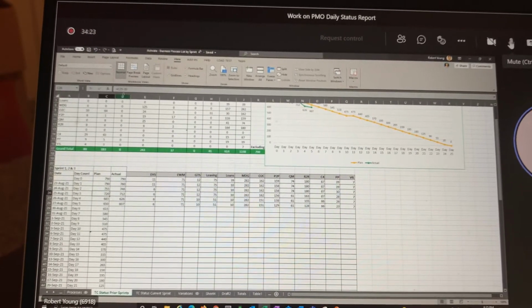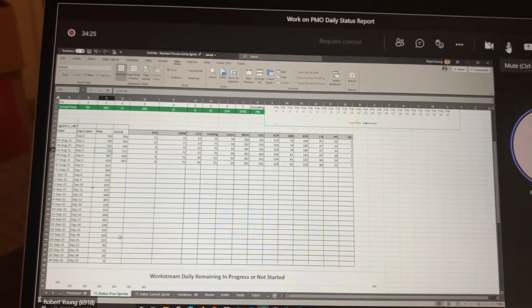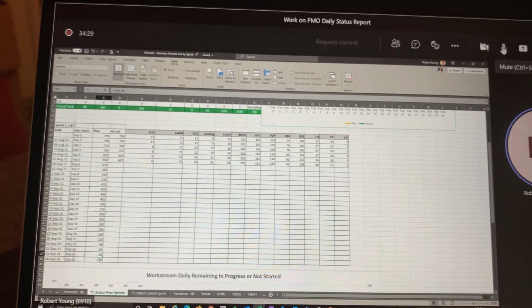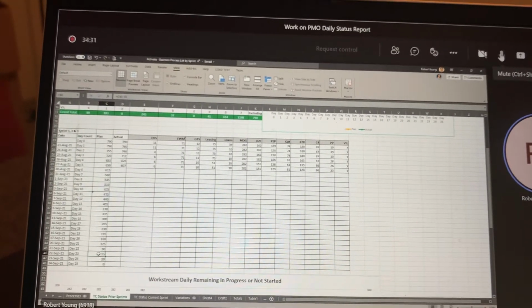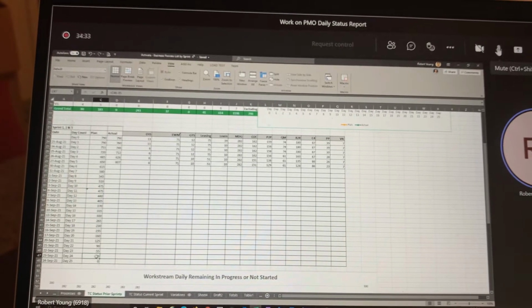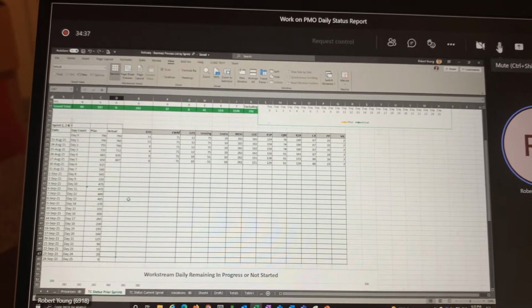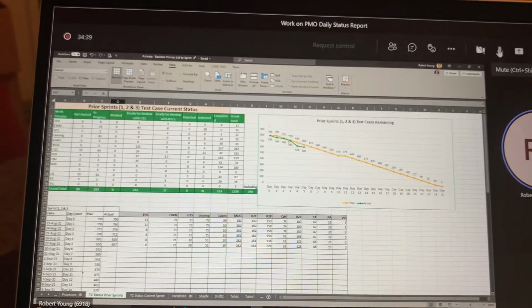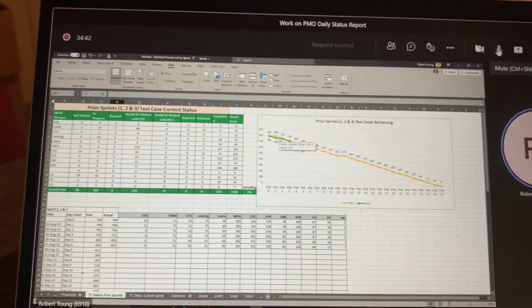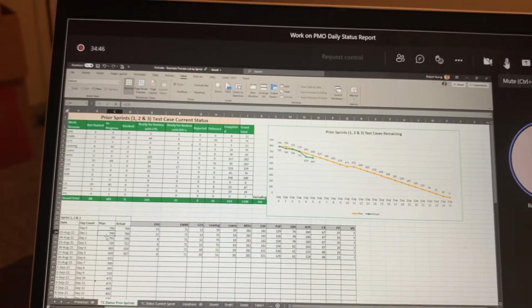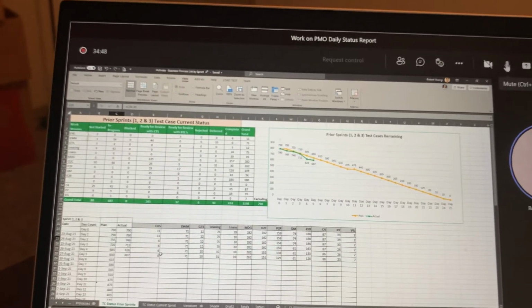Right now, the burn down is set at 35. We actually probably could just leave it because we still get down to 0. It's just burning down 35, 35, 35, and then 20, and then we get rid of 20. So maybe we'll just leave it. I think at least we'll have a more consistent trend, but the starting point is a different number than where we were yesterday.